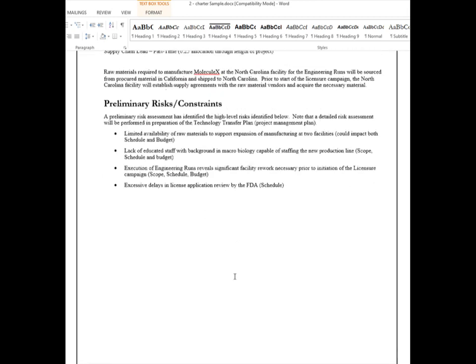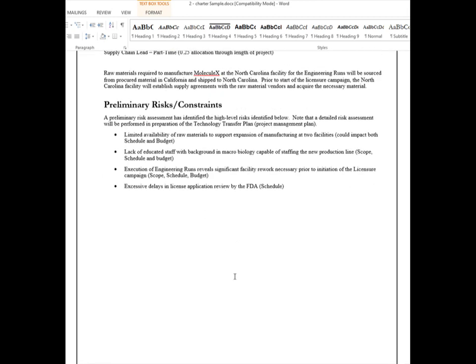Okay? This is our charter. When you're writing your charters, I want you to be mindful of you're describing for me, your project sponsor, how you're going to solve my problem or help me achieve my opportunity, take advantage of my opportunity. Who, what, when, where, why, how. Be clear, be concise, and be specific.